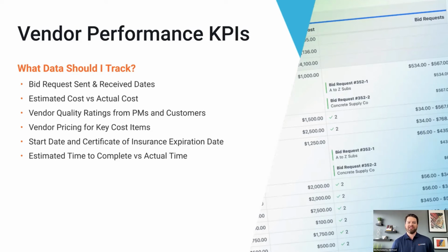And unfortunately, there were a couple of guys that knew to provide it to us, and they just sort of voluntarily sent it. But because we didn't ask for an update every year, a lot of the guys never provided one. They didn't renew the policy. We couldn't provide it. We ended up getting fined $35,000 by our insurance provider because we were sending subs without a COI. Again, I just took over the business. I had no idea that we needed to track this, but what a silly fine to receive. All we needed to do is track when the renewal date was so that we followed up with them. Do it. It costs you nothing.